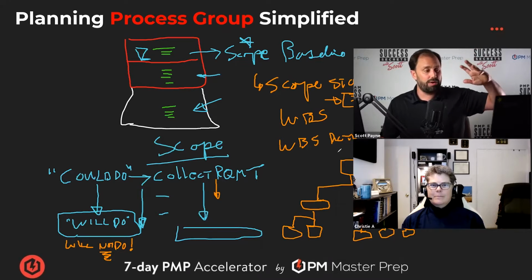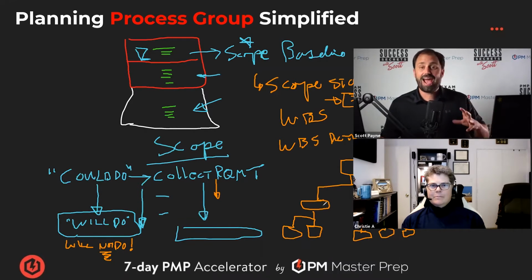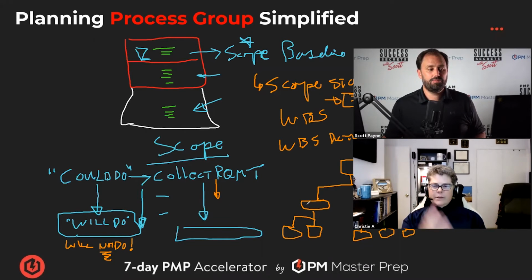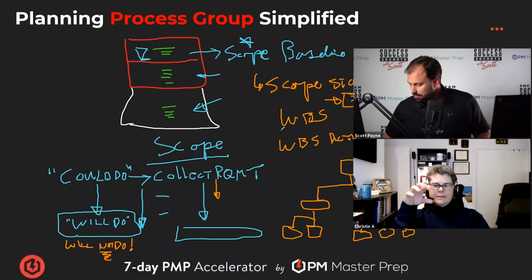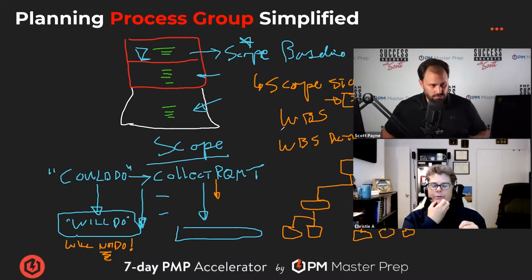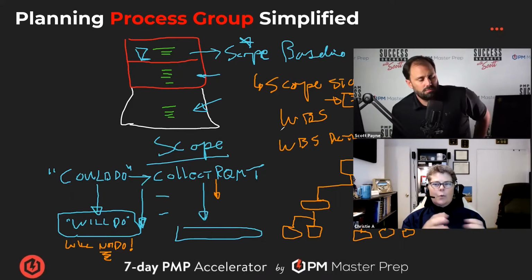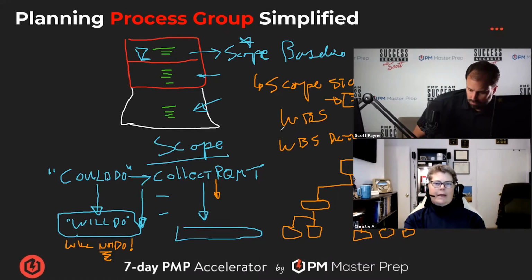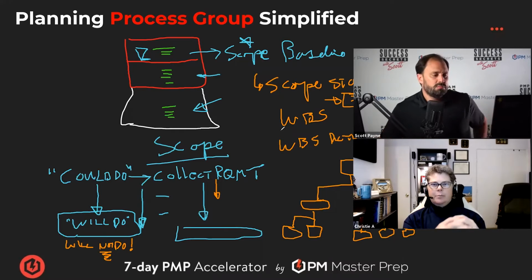I'm not an expert, technically, but they do say that the WBS has the activities. If I always said that is wrong, what does it have in it? Well, in my brain, it's what you're gonna do. But it's hierarchical, right? You start at the high level and then you break it down, just like what you drew, and it tells you that work package. So what you'll do within this box, this is what you do.